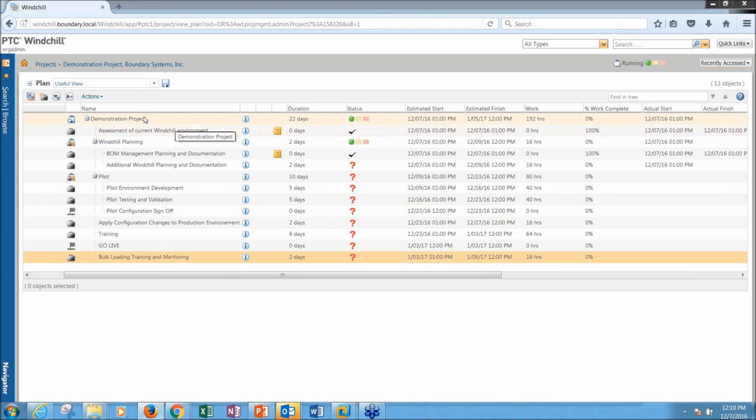You aren't even locked in with the template. Again, I can build the template with the overall plan, and as I initiate a plan from that template, I have the flexibility of, okay, this one, maybe we're outsourcing this part of the design to an outside partner that we work with. So we know they're not going to be logged in directly giving us updates. We're going to use manual execution for that project. I can still keep track of everything, and everybody can log in and have the documentation managed there.